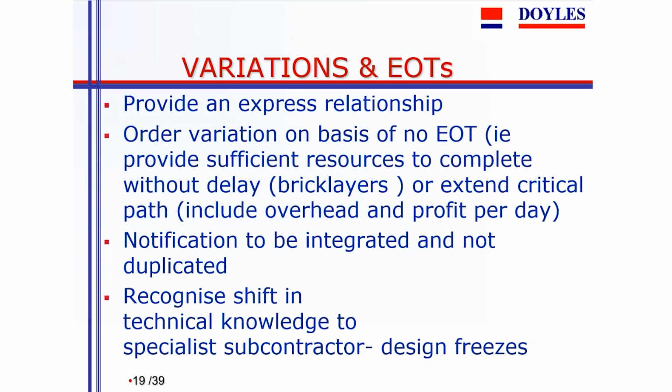Additionally, one should, as a matter of analysis, say, well, on what basis am I awarding a variation? You could say, I'm ordering a variation and you should be able to fit it in with your existing work and it won't cost you any extension of time or any real cost. Or it could be a situation where you're ordering a variation on the basis that there'll be new resources dedicated to the project that'll carry out the variation without any need for an extension of time. And sometimes it's a bit obscure and left to judgment as to whether the variation involves an extension of time.